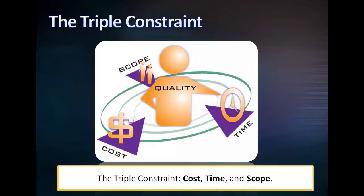These three elements of a project are known to work in cycle with one another. Where one of these elements is restricted or extended, the other two elements will then need to be either extended and increased or restricted and reduced in some way. For example, if a client introduces additional scope to the project, you would need more time and more money to execute the additional scope.